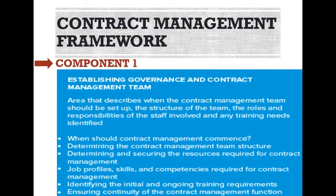Component one: Establishing governance and the contract management team. This area describes when the contract management team should be set up, the structure of the team, the roles and responsibilities of the staff involved, and any training needs identified. This includes: when contract management should commence, determining the contract management team structure, determining and securing the resources required, job profiles, skills and competencies required, identifying the initial and ongoing training requirements, and ensuring continuity of the contract management function.